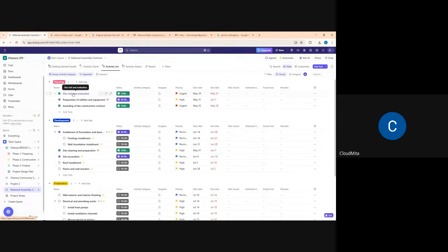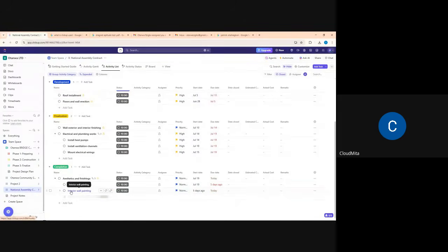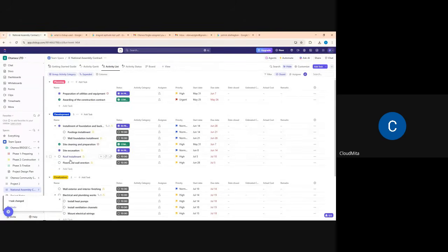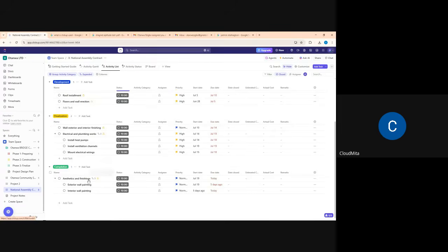What do I mean by clearing the board? It means that as this task is marked as completed, what should I do? Push it down to this one at the bottom here. So we are doing automation such that whenever a task is marked as completed, that task will go on its own to this part at the bottom here. That's what we are trying to do here now. So watch me. If you didn't learn it when we did our Monday.com automation, follow me now. You see where they put Automate here? So you see Automation here? Automate. Now click it.